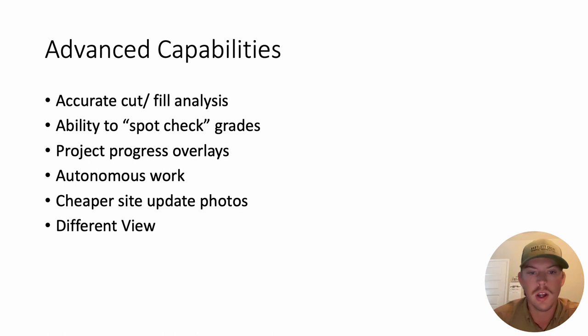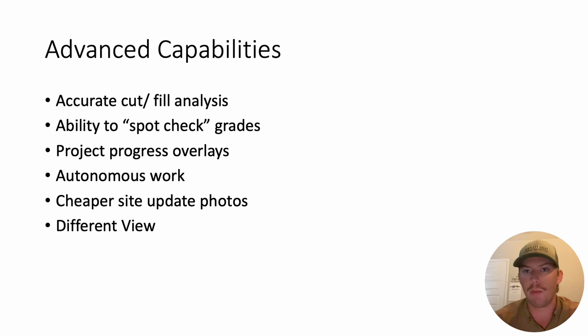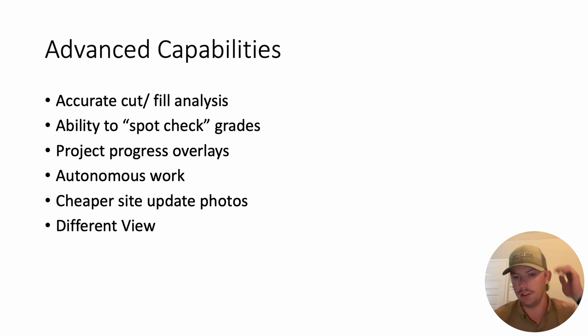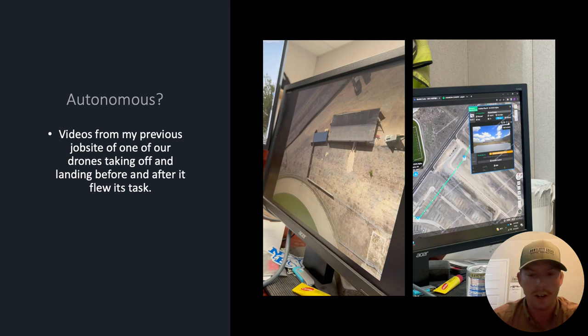Advanced capabilities: we can get an accurate cut and fill analysis, spot check grades using the drone. I've done that before — sitting in the office trailer, we were able to spot check grades on the site. Project photo overlays let us see how we were back in April of last year compared to October, or the beginning of this year compared to today. Also cheaper site update photos and a different elevated view.